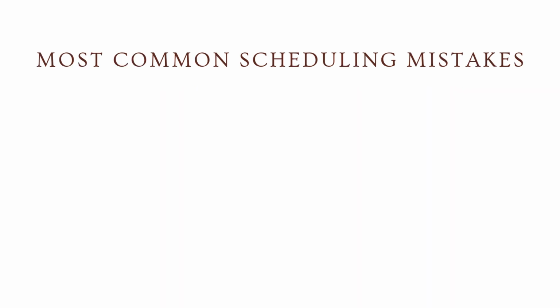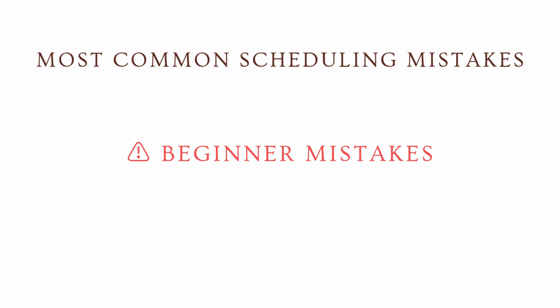New planners often make these mistakes: tasks not linked, durations too optimistic, no milestones, missing dependencies, ignoring resource overload. Avoid these and your schedule will immediately improve.